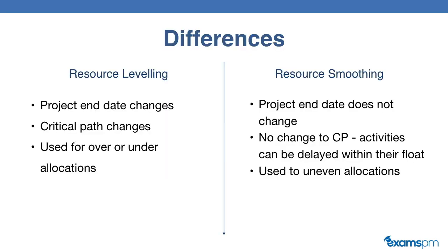Let's compare and contrast the difference between resource leveling and resource smoothing. In resource leveling, the project end date does change. This is usually used for tasks that are on the critical path, so if there is an extension of the schedule, the entire project will take longer to complete. It is usually used for over- or under-allocation of resources.